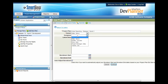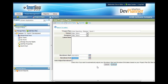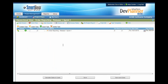If you are using Agile, you'll probably want to choose the Scrum Master or Assignee, because this will be the person managing this particular project plan. Since we are using Agile, we may want to lock in start and end dates — simply choose the first date and then the second date. You can use the up and down arrows on your keyboard to increment or decrement dates. If you're using a waterfall type environment, you would leave the burndown dates blank and check Auto Adjust Burndown. But since we're using Agile, I'll unclick that to lock in these dates. Once I press Continue, it'll create a blank plan and we can begin adding tasks.